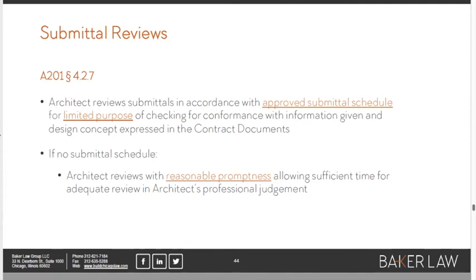All that I would say is that if you get a complicated submittal on Christmas Eve, you're going to have a heck of a time, if you're an architect, getting that thing reviewed by New Year's Day, especially if it's an elevator and you've got to talk to a lighting consultant, and talk to some kind of a millwork fabricator, and have the plumbing engineer think about the sump. Good luck getting that reviewed between Christmas Eve and New Year's Day.